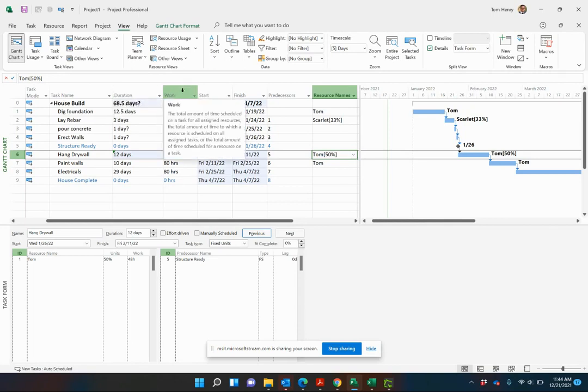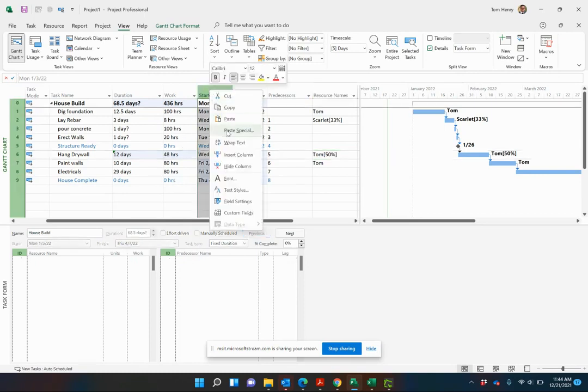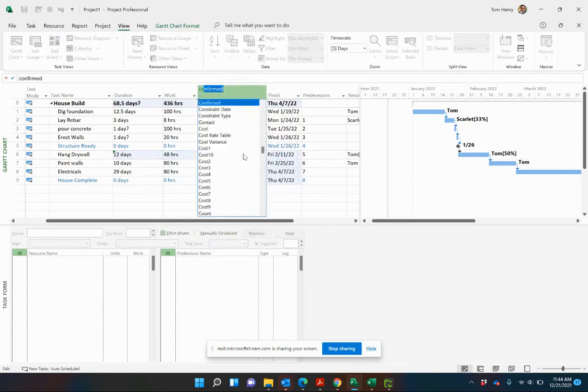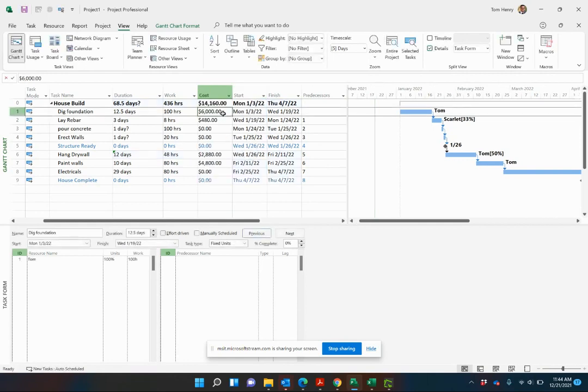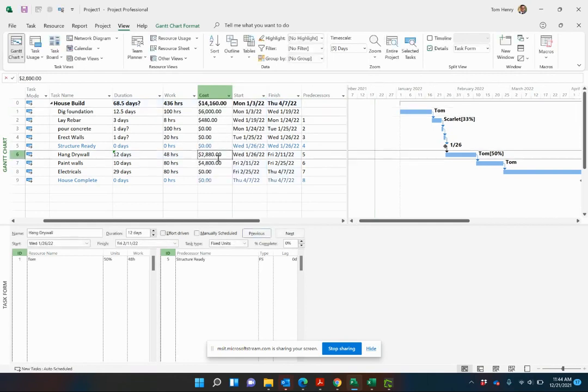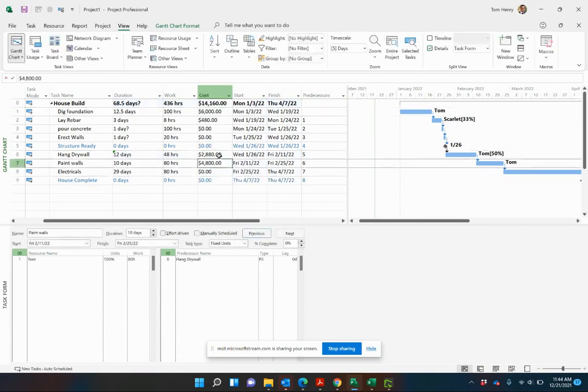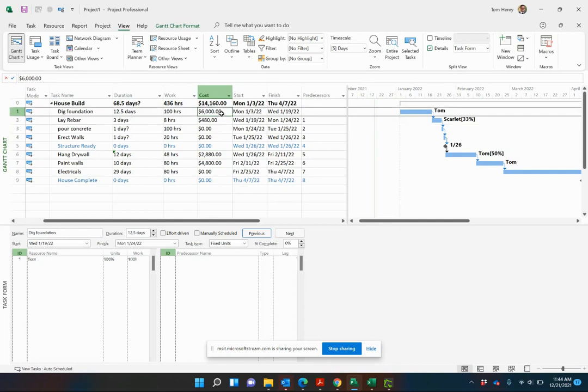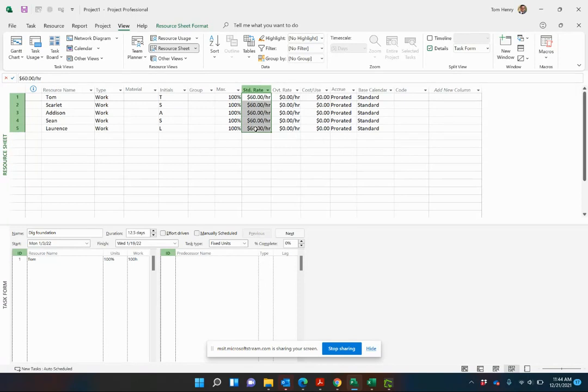Estimating duration and work can really help you when you're calculating out the most important thing in your project, which is going to be the costs. As we get very granular with this, the costs are going to be calculated for us based on the resources hourly rate. Very important. When estimating the duration, estimate the work so that when you assign a resource, we're getting an accurate picture of how many hours that particular resource is going to work on that task.